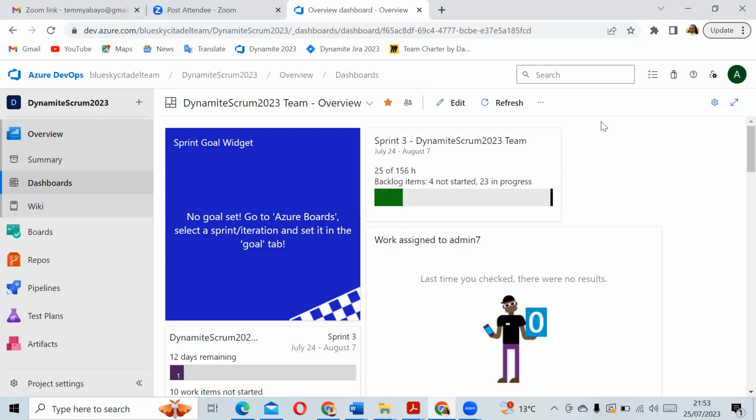So they can save it. And once they've done that, they go back to that state, they click on the drop down, it gives them all the columns. And then they pick the developers column and put it in there. Most times when QAs create bugs, they create it, they save it, and they leave it. They don't know it goes into the backlog. To them, it's gone to the developer.